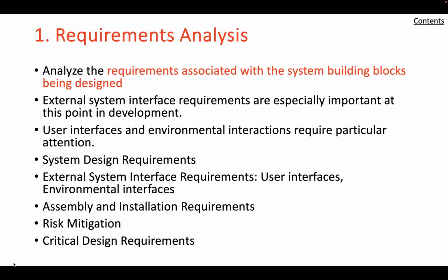We also have risk mitigation. And so this is covered in another lecture, another chapter. A necessary step in the planning of the development and engineering process is the consideration of program risk. In the advanced development phase, risk assessment was used to refer to the process of identifying components that required further maturation to eliminate or greatly reduce the potential engineering problems inherent to the application of new technology or component functionality.